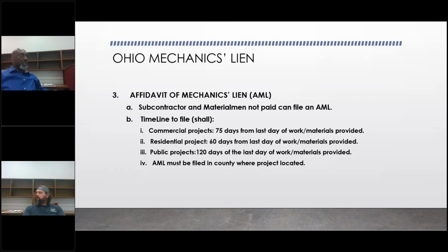Jared, since we have a large number of people not familiar with this, you're talking about the lien waiver. In your experience, what benefit is that to you? So a lien waiver, from my perspective, is more about protecting my customer than myself, because I'm waiving my right to lien the property. When you lien a property, from my outside perspective, you have first rights if that property ever gets sold, or the owner wants to transition the property to another entity. If you have a lien on the project, you have first rights to make sure that whatever dollar amount you have been unpaid for gets compensated to you before they can sell and make profit on the property to somebody else.